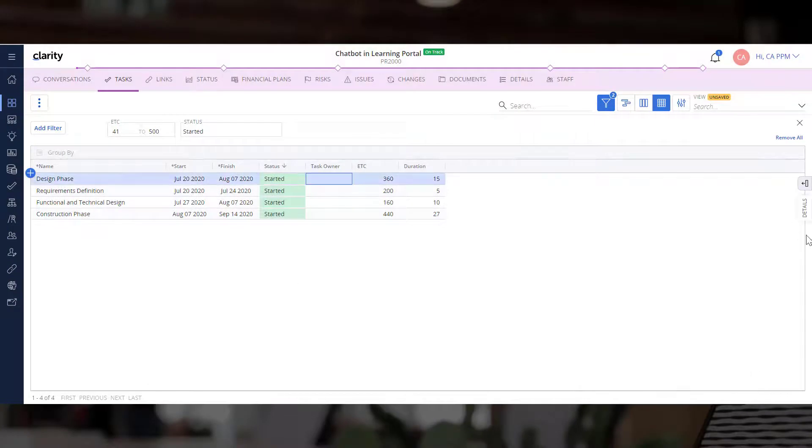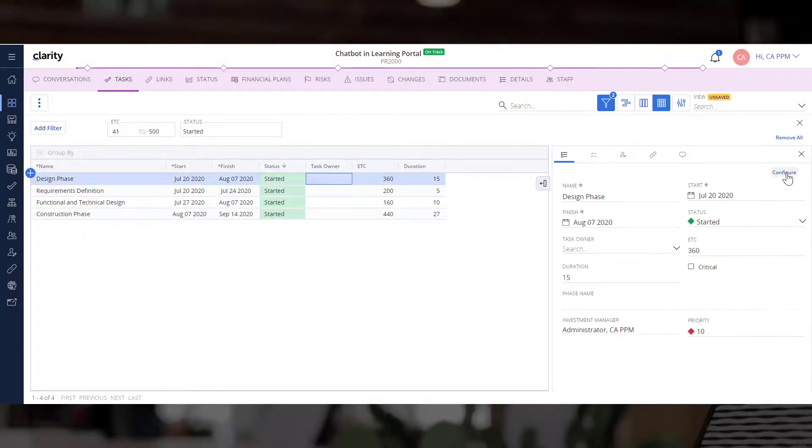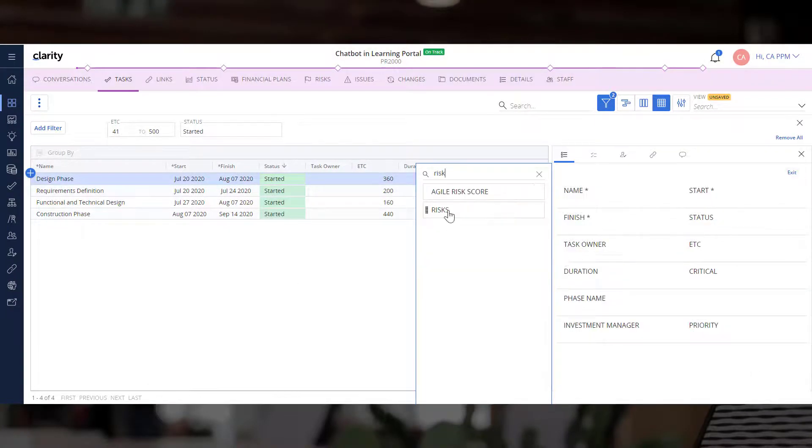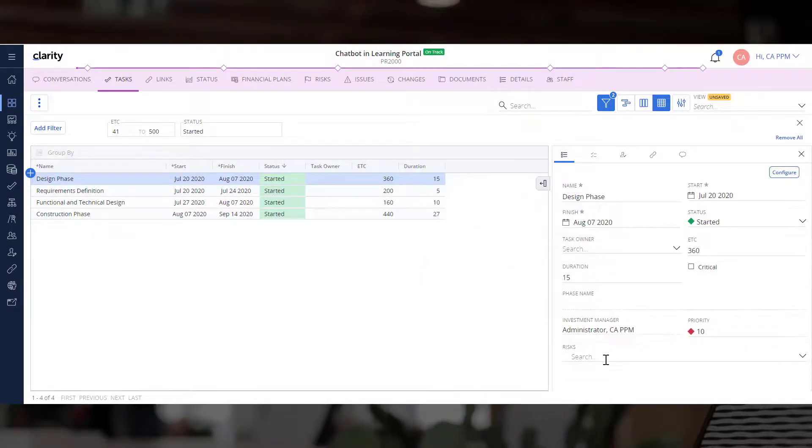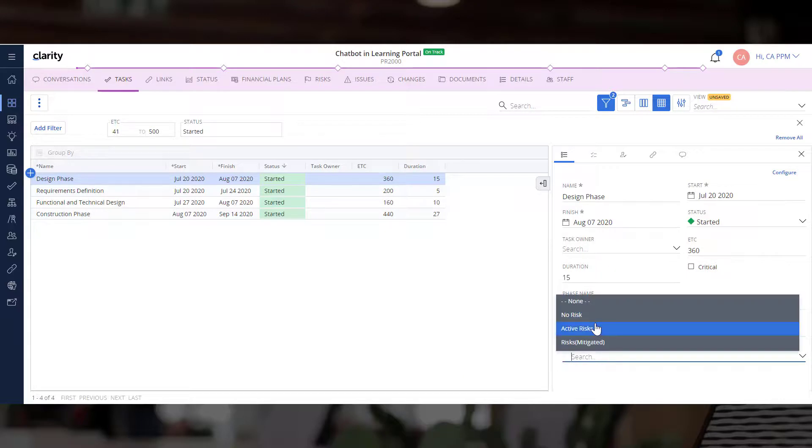We can now add the Risks Pick List to the grid so that you can sort and group tasks based on risks.